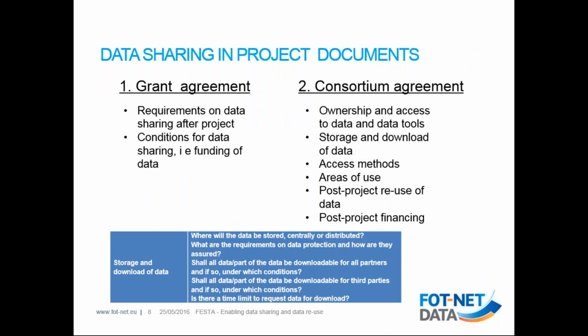And if I go one step down and detail it a bit when it comes to the project documents. If we start with the grant agreement, it's important to take into account if you have any requirements on data sharing after the project. That could be that the funder is pushing it, that if we are funding all this data, we also want it to be available after the project.